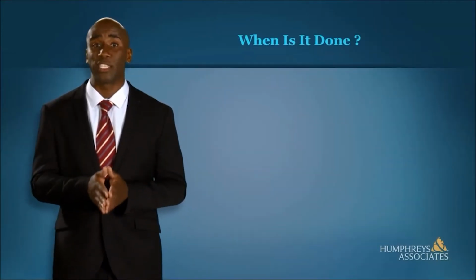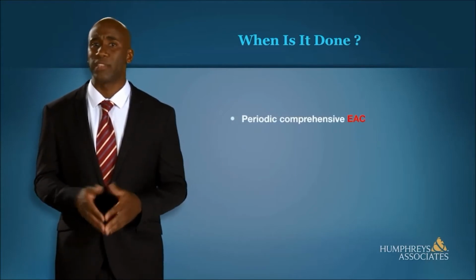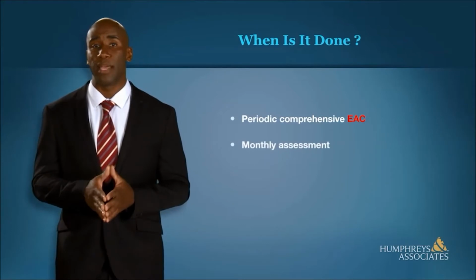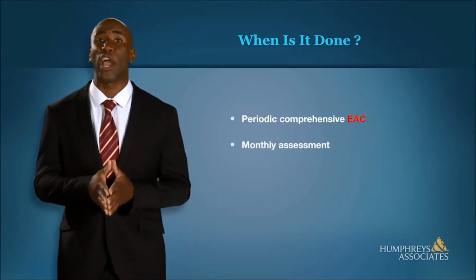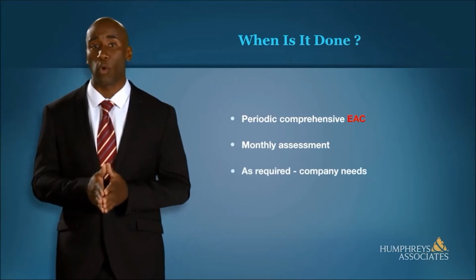It is logical to conduct periodic comprehensive EACs. So what is a comprehensive EAC? A comprehensive EAC is a bottoms-up estimate at completion which requires reviewing all the remaining work and completely re-estimating that work. Obviously, this is a big job.